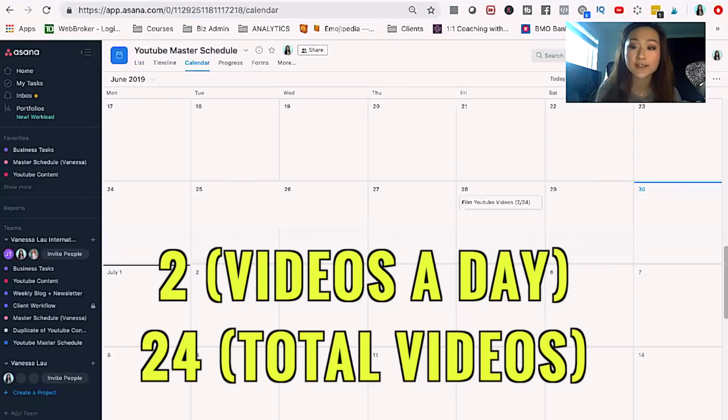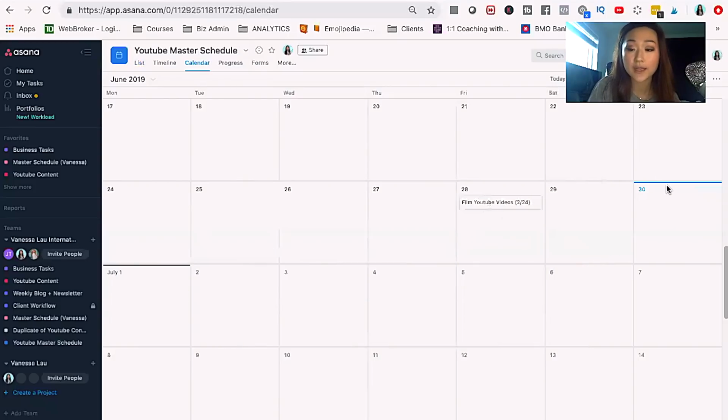Now, you might be wondering, why did I put 2 out of 24? The reason why is because I've already told you that my max capacity generally is only 2 videos a sitting. And the reason for this is based on how my schedule works. I have a lot of client meetings. I have a lot of other things besides YouTube that I do. So I'm only really willing to dedicate 2 videos per day. And the reason why I'm putting 24 is because I know I need 24 videos in total. So knowing this, I'm going to keep repeating this process up until I get a total of 24 videos. And the reason why I'm doing this is because I want to know the exact date of when I should expect my batching to be finished.